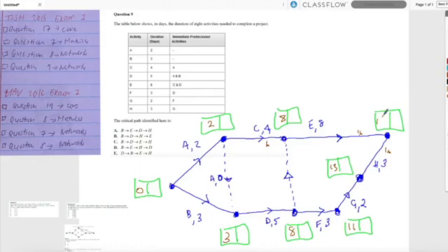Oh, that's interesting. Now back scan. Earliest completion time 16. 13. These ones are all going to be spot on. Now careful this way. 16, 8. Aha. This way, 5 and 8 is 3. Going back, we take the smallest, remember? 8 take 4 is 4. So that way we're going to get some slack time there. And 3 take 3 is 0, but that way, yeah.